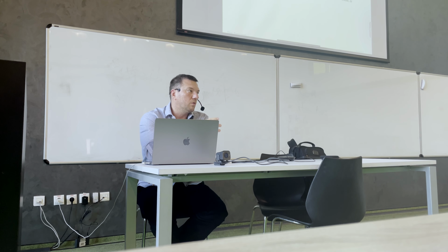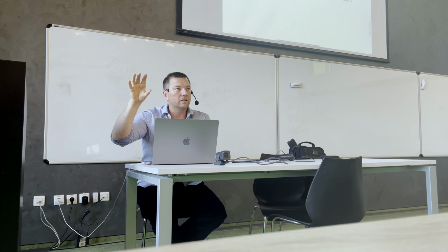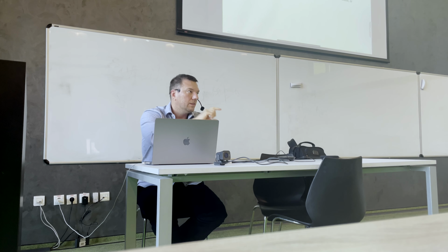So your project schedule probably should start with, this is the list of tasks which need to be done. This is the estimate which we collected from programmers. Use 3-point estimate. This is how we put these activities, which one depends on which. And then this is our critical path. So how we draw the critical path. And that's our schedule baseline. So we work like this. Make it short, 1 page. Imagine that you have real people who will read this document, so it should be absolutely clear. Remove the noise, remove all the unnecessary information. Just a clear list of activities, the diagram, the Gantt chart, or the critical path method.